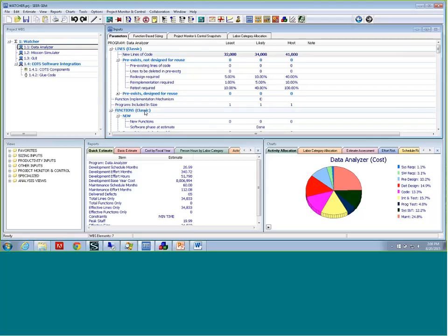It could be a simple, high-level estimate with one element, maybe at the very beginning of conceptual ideas, or it can go all the way to a very detailed breakdown where you have a breakdown of components, and of all the COTS products and the different applications. Because of the hierarchy that you can do with roll-ups, you could make it into the different stages of the estimation. If you have your early stage, then your detailed one, then an even further breakdown, or even the approval one. So you have a lot of flexibility when it comes to building your work breakdown structure.